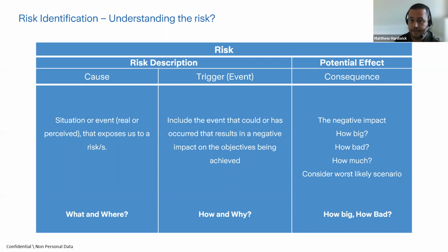Risk management always says start at your worst case scenario and work your way backwards from there. That then allows you to consider how you're going to articulate the future elements of this risk in terms of the scoring, the probability, the impact of it. But think of the risks that you've got in existing risk registers and challenge yourself as to whether they are providing information for each of those three elements: the cause, the trigger, and the consequence.